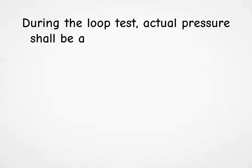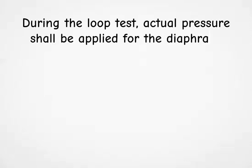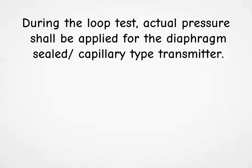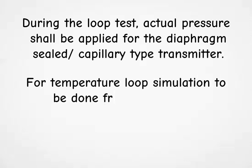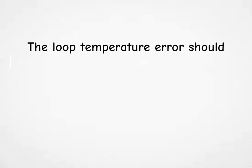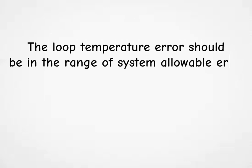During the loop test, actual pressure shall be applied for the diaphragm sealed capillary type transmitter. For temperature loop, simulation to be done from the element. The loop temperature error shall be in the range of system allowable error.